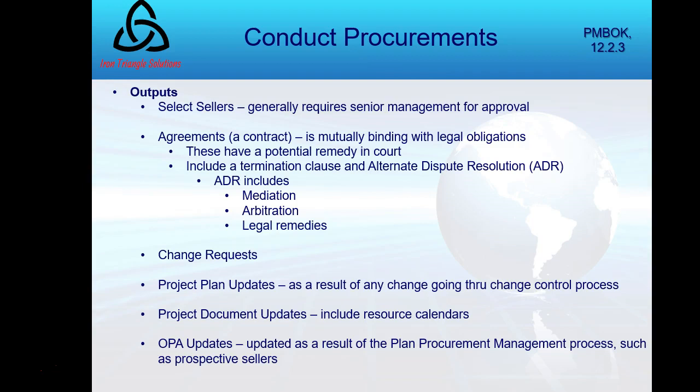The contract signed, now it's mutually binding. So keep good records, that sort of thing. And it should include a termination clause and how you would proceed for ADR, alternate dispute resolution. Remember we talked about that, and those come in generally three types: mediation, arbitration, or legal remedies.